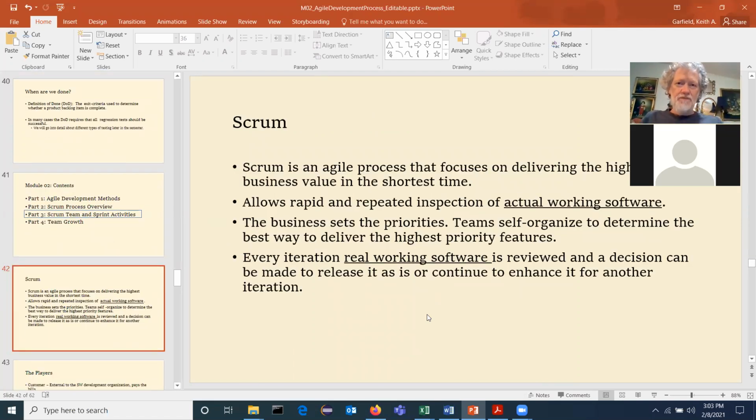So Agile Scrum, we've talked about before, it's an Agile process. What does that mean? Agile means that you don't do all of your planning and design up front. You do enough planning to get a shared vision among the team, shared situational awareness, enough understanding of what you think you're going to develop so you can move forward. And then you start producing the product in these short, relatively short increments. Short meaning 30 days or less, and we're using 2-week increments, so we have 5 2-week increments.